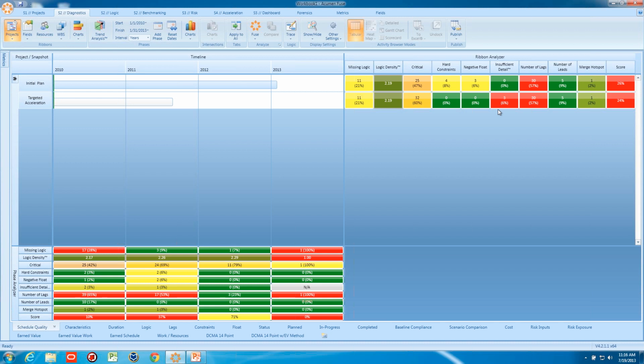At that point, when there's durations higher than 10% of project execution, we tend to feel that there's not enough detail in the project schedule. So that's something that you might wish to address if you do cut the time frame down on a project, is some of your durations might be really too large relative to the overall size of the project. So overall, we haven't improved our score at all, but this is an iterative process. We could continue to make tweaks and changes and hopefully end up with a higher fuse schedule index score. But we're not going to do that right now.